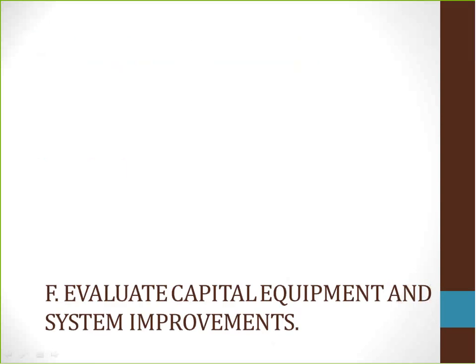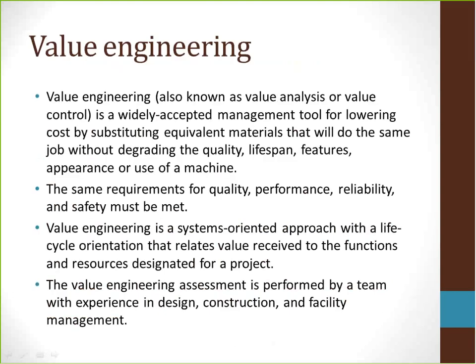Next, evaluating capital equipment and system improvements. Value engineering, also known as value analysis or value control, is a widely accepted management tool for lowering cost by substituting equivalent materials that will do the same job without degrading the quality, lifespan, features, appearance, or use of a machine. The same requirements for quality, performance, reliability, and safety must be met. Value engineering is a systems-oriented approach with a lifecycle orientation that relates value received to the functions and resources designated for a project. The value engineering assessment is performed by a team with experience in design, construction, and facility management.